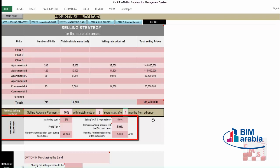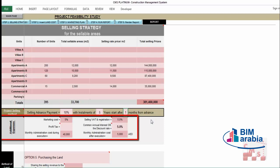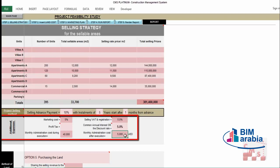There are additional expenses beyond construction costs. The CMS figures already represent the full construction cost from the contractor's perspective — material, labor, overhead, and some taxes. But as a developer, there are further expenses from your side: marketing cost, selling VAT, profit tax, monthly administration during execution, and monthly administration after execution — since you will still be receiving installments and have overhead even after construction finishes.